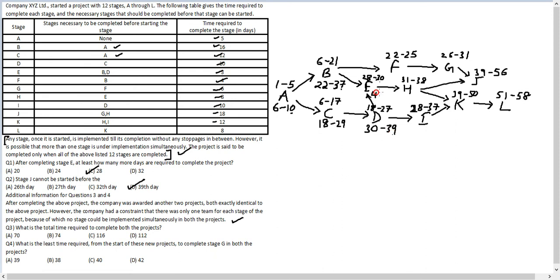For project 2, stage E has constraints at days 30, 37, and 39, so it starts on day 40 and goes to day 42. Stage F has constraints at days 25 and 37, so it starts on day 38 and goes to day 41. Stage H has constraints at days 42 and 38, so it starts on day 43 and goes to day 58. Stage I has constraints at days 37 and 39, starting on day 40 and going to day 49. Stage G has constraints at days 41 and 31, starting on day 42 and going to day 47.